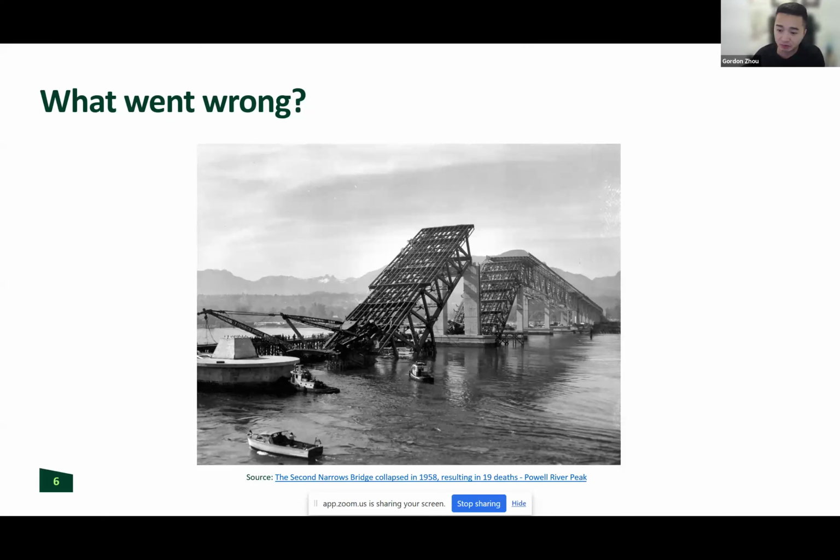Okay. In this example, another area that relates to risk management, or the lack thereof in this case, is that the changes that led to this collapse were not properly assessed. So adjustments were made, but weren't fully analyzed, especially from a safety perspective. The team did not really fully evaluate what could go wrong if I did this instead. And so the other thing that comes to mind is that as we go through changes in a project's life cycle, it should trigger a risk reassessment.